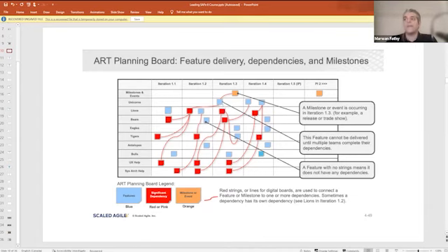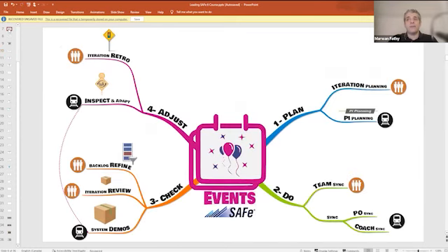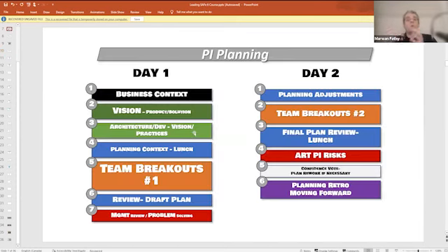But they are dependent on the lines. They need the lines to deliver and complete something in iteration 1.2. And the lines, in order for them to deliver this part to the unicorns, are dependent on the bears in iteration 1.1 to deliver part of that. So the beauty of that event is that when everybody's present, we know what we are talking about. We know our dependency map. We can have discussions, some arguments. Can you take this part? Can you take that? This is very engaging and lets people feel a very high degree of ownership.